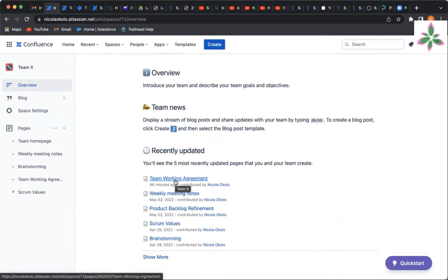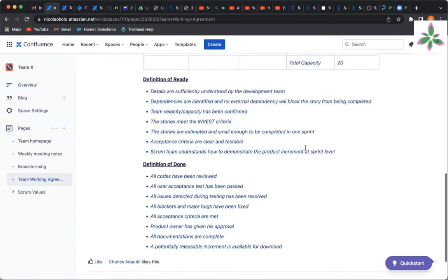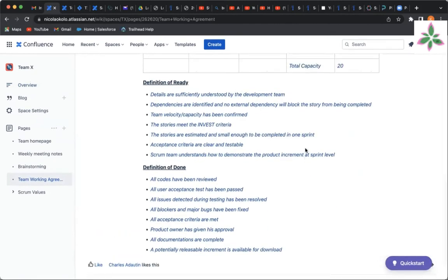number stood for. So I saw that during your planning poker session, you did 1, 2, 3, 5, which is Fibonacci, but there was no explanation as to what 1, 2, 3, 5, 8, 13, what those numbers meant, right? On your Confluence page, let it be clearly stated so that if anyone is new on the team, they can quickly understand what a story point 1, 2, 3, 5, 8, 13 means. So it's always good for them to know what those numbers mean in terms of complexity, effort, bug fixes, and administrative overhead.